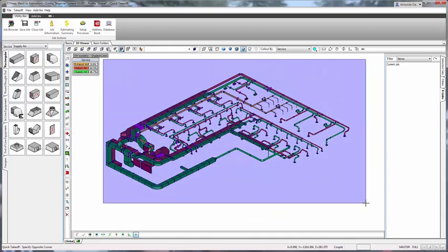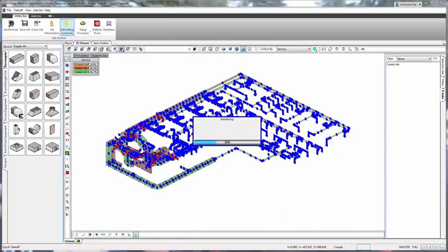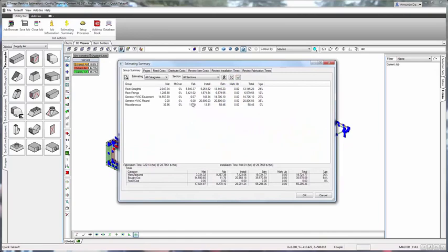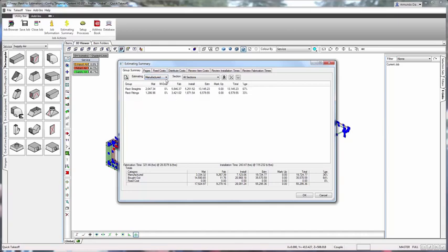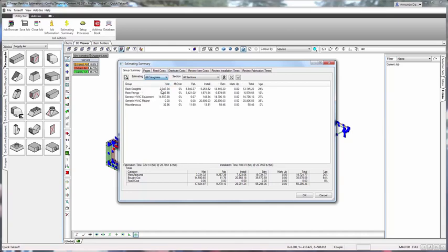Using the BIM-based fabrication model, you can use Fabrication SMP to quickly see an estimation summary of the project. You can view an estimate for manufactured, bought out, fixed costs, and all other categories.